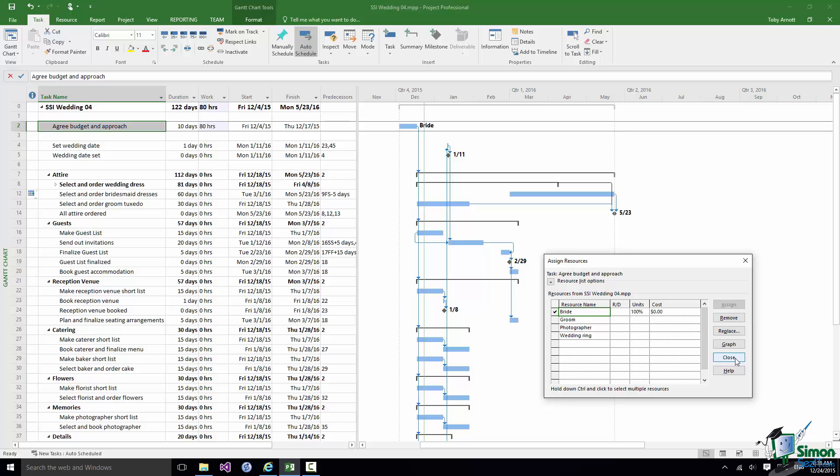Now one very important point I'd like you to bear in mind here, and this is going to become increasingly important later in the course, is that the 100% means that the Bride is working on this task full time. Now in reality it may well be that she is not working full time and that she's actually doing her day job most of the time and she's just spending a certain amount of time working on in this case the budget and approach to her wedding. But for the purposes of this particular project, and this will not be the case for the bathroom refit, but for the purposes of this project all I'm going to do is treat that 100% as being all of the time that she has available. That doesn't mean to say it's a 40 hour week or an 8 hour day or anything else. It just means that all of the time she's got available she is going to spend on that task while that task is in progress.